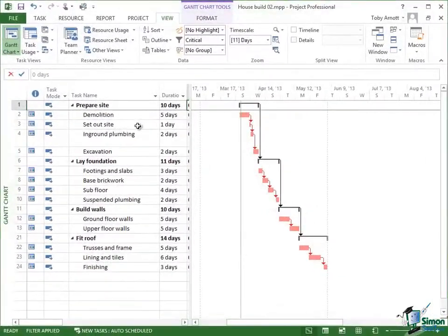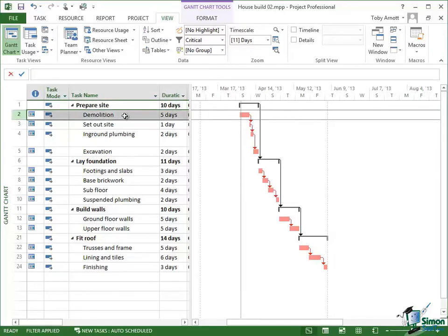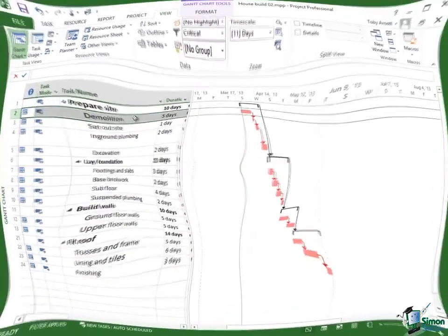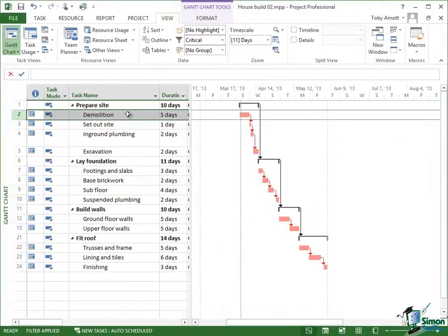So we've got making the tasks shorter, and we've got overlapping the tasks. Now, when we talk about making tasks shorter, it isn't only about reducing the amount of work. It's often more about reducing the elapsed time for tasks. So it might be 5 days work, but could we do 5 days work in 3 days? And then we look at options like, what about working overtime? So in each of these situations there are very practical considerations, and there's usually at least 2 or 3 different approaches to achieve a specific objective.